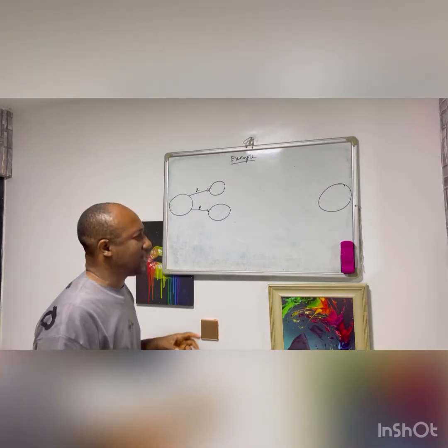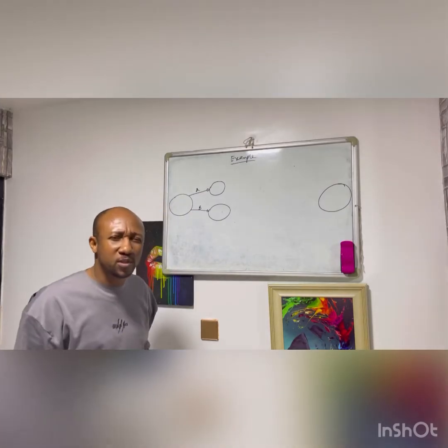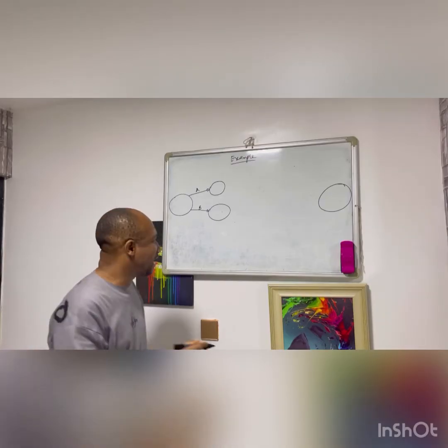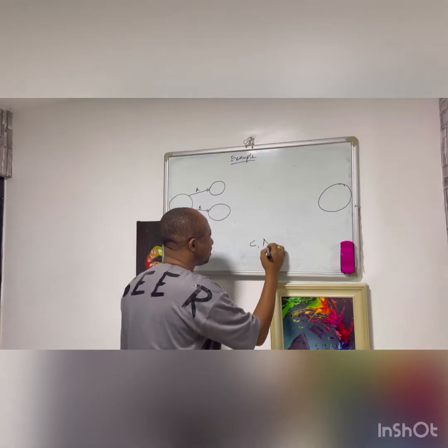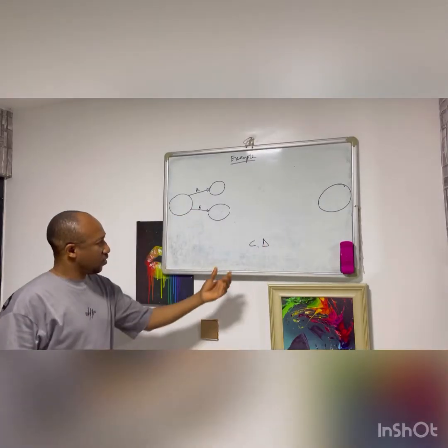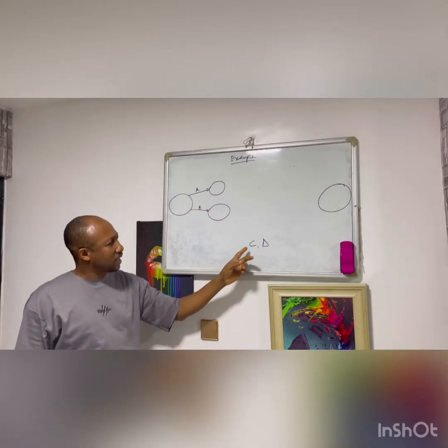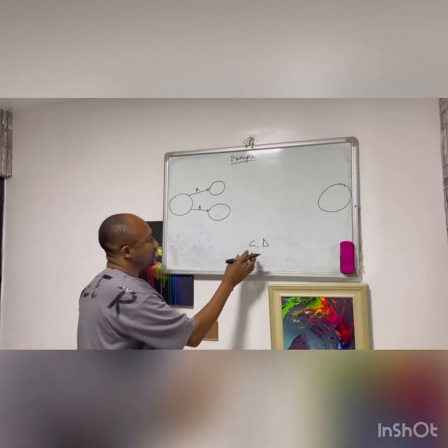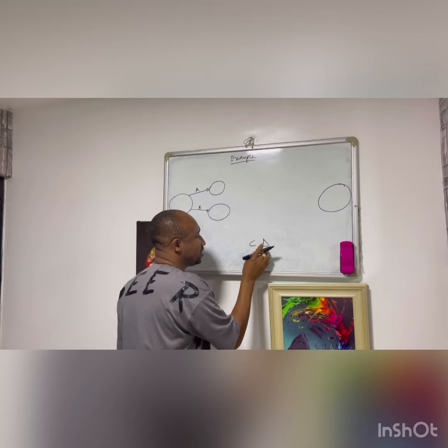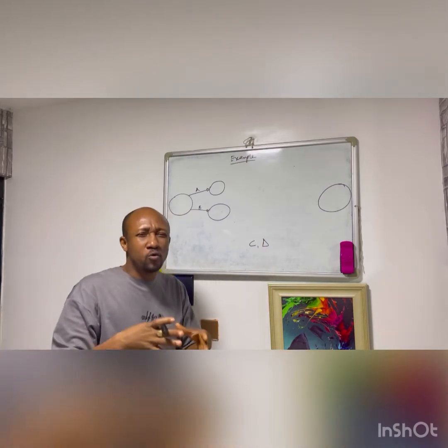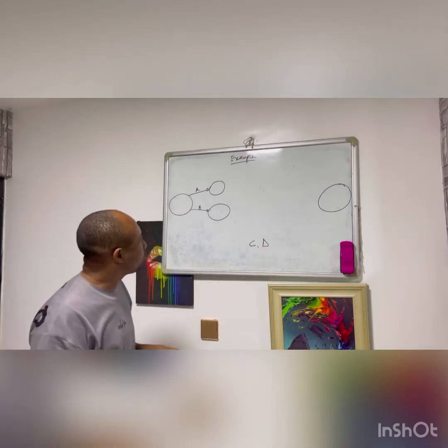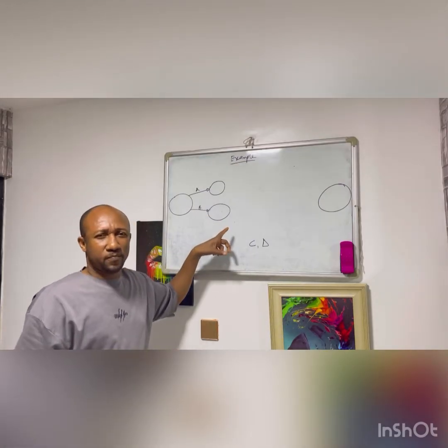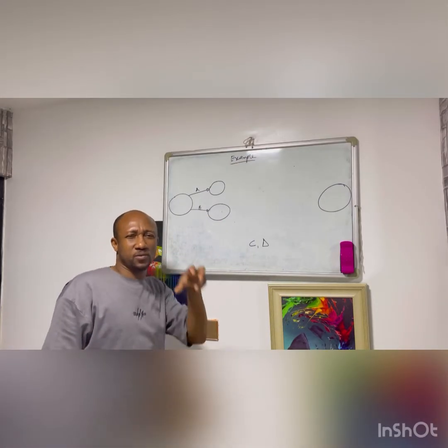If I look at that same preceding activity column, I can find activity C and D together. What this means is that activity C and activity D are going to conclude their task into the same circle.